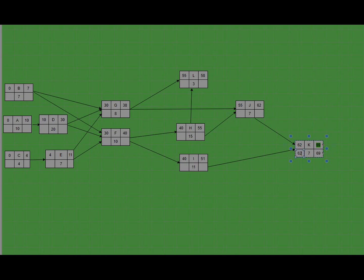Task K depends on task J and task I. Using the dependence line, the late finish for task J is equal to the late start of task K, so here we have 62, and here we have 55. The late finish of task I is equal to the late start of task K. For task A, it falls in a similar category, so we can put 62 here.